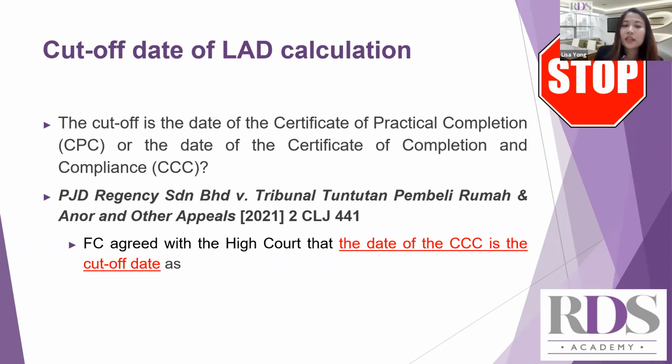The CCC is issued to certify that the property and the common facilities have been constructed and completed in compliance with the approved plans and requirements of the Street, Drainage and Building Act 1974 and its bylaws.